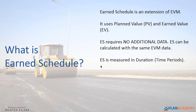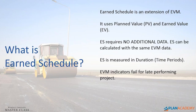Some of the Earned Value Management indicators fail for late performing projects, but the Earned Schedule indicators are reliable. They stand up properly when projects are late and past their deadline. They measure how the project actually performed in the past and forecast future time performance. This is one of the main reasons that Earned Schedule is really great.